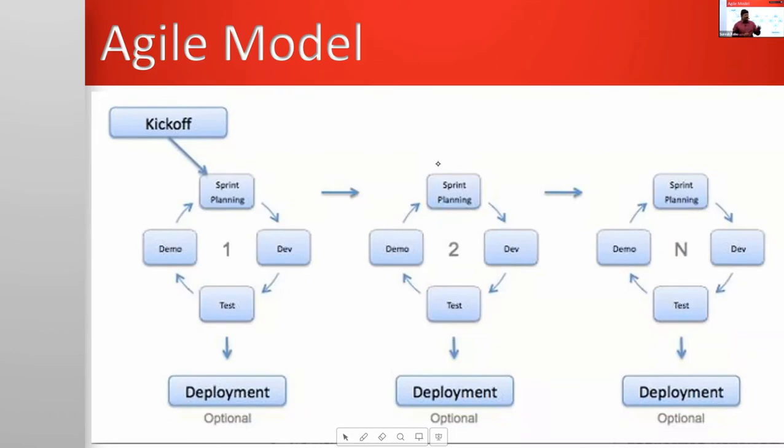Rather than asking the developer for 30 days to develop this, you give 3 days. Rather than giving 10 requirements to a developer with 30 days of time, give only 1 or 2 requirements with 2 days of time. No chance of skipping even 1 hour, correct? Rather than understanding 40 requirements, you focus on understanding only 2 requirements, where the understanding level would be high. Instead of planning all work together, you plan small work, do it, then go for the next 2 requirements. In this way, you'll get a very productive output.